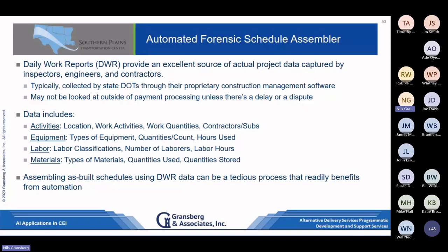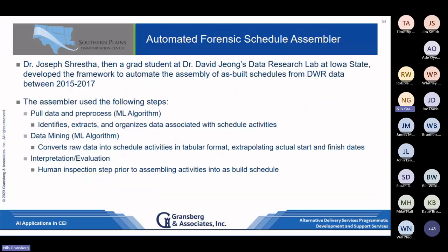I've done this more than one time myself, but assembling an as-built schedule is tedious. It takes time. You have to be real careful. You've got to double check what you're doing, and when you manually construct them, it just takes a lot of time. You've got to make sure that you've not made any logical errors. You've got to check all your activities and all of your durations. You've got to check all that stuff and be able to document it, right? And back up those documentations. So being able to automate some of this can really give you more time to do the analysis, and look at causation and those sorts of things.